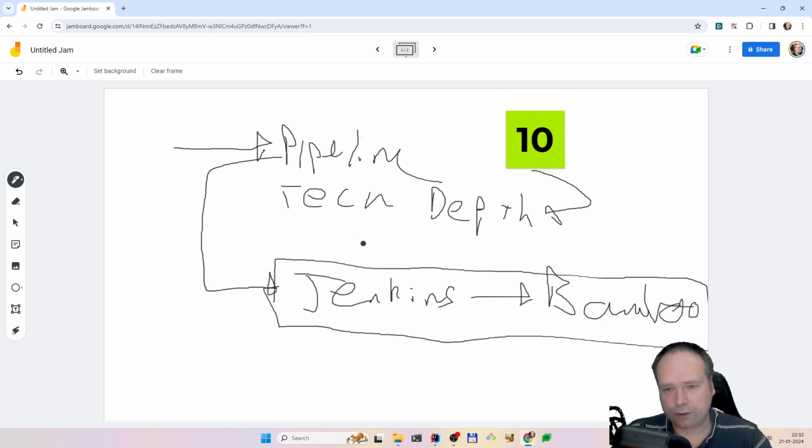And especially if you have short sprints, then you will have retrospectives very often. If you have short sprints, then you could think about skipping every second retrospective, so you only have it every second time. Especially if in your daily Scrum meetings in the mornings, maybe you would allow for a second round or an open round, where you also try to solve problems. Then a retrospective is definitely not needed every time, or every sprint. If your sprint is maybe 1 or 2 weeks long, I would recommend sprints of 2 weeks. I think that's a sweet spot for me, at least.